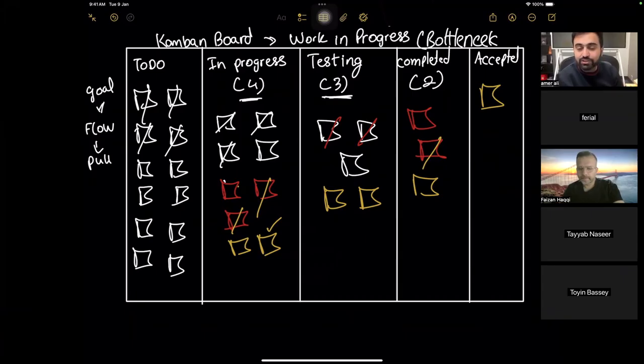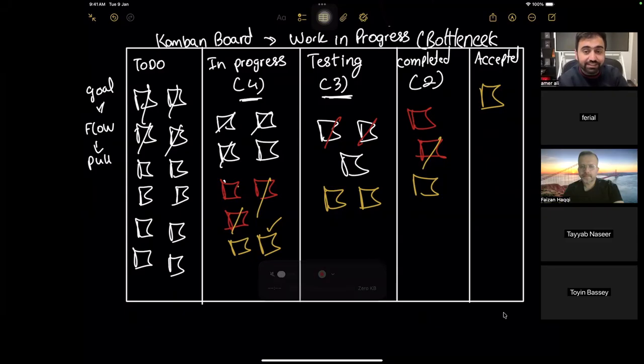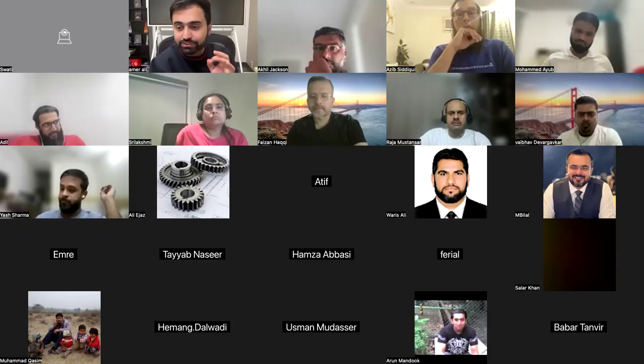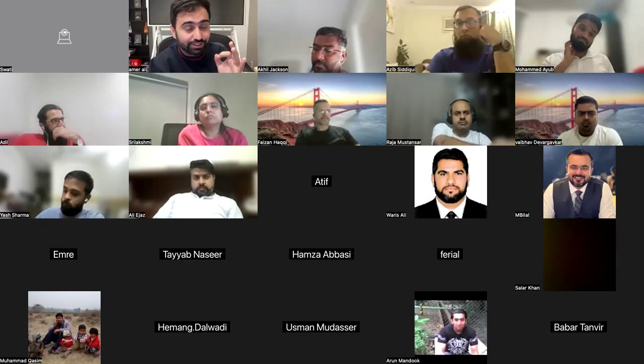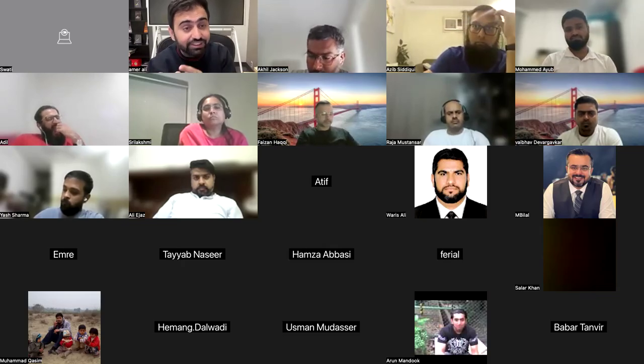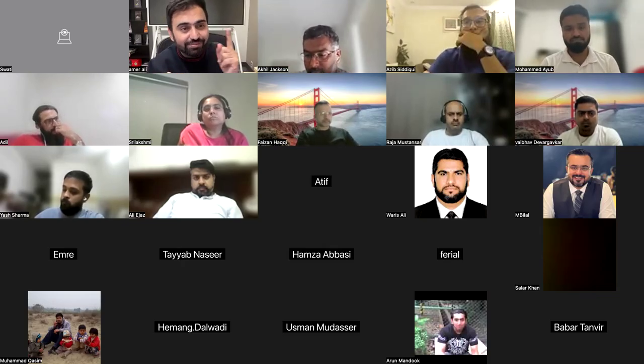And there are 3 user stories which we are still working. So this becomes the bottleneck. Testing becomes the bottleneck. Anything that stops you becomes the bottleneck of the project. Anything which has no buffer becomes your bottleneck.